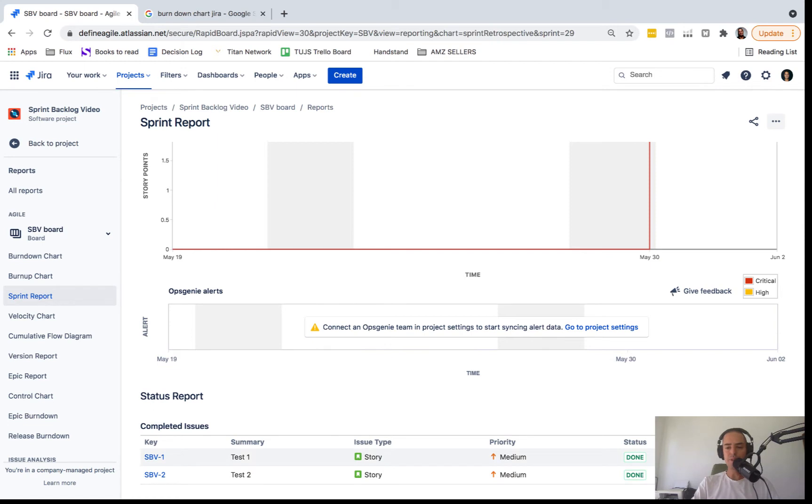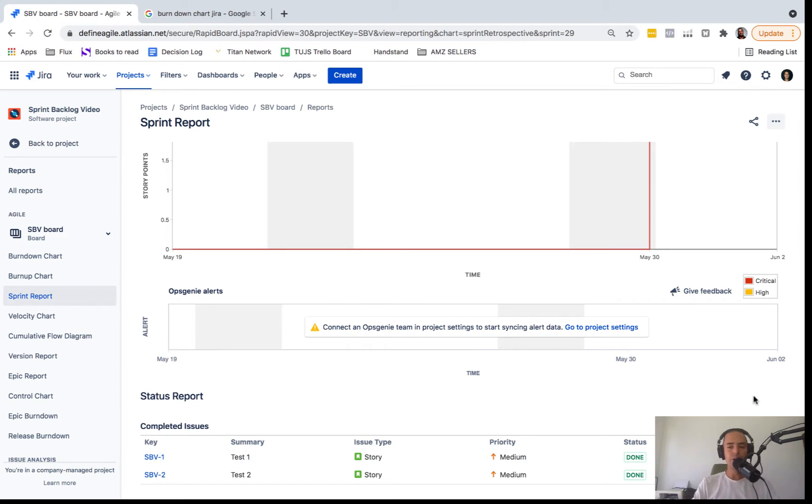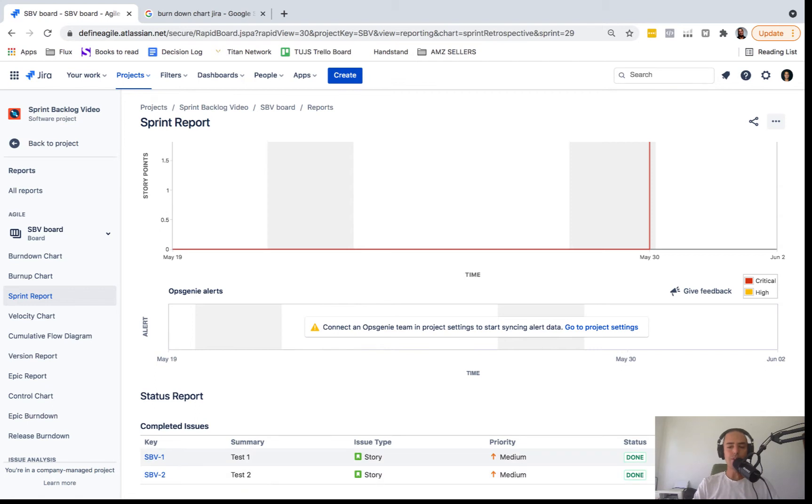But here when you look at the stories, it says nothing to two, which means somebody put an estimate after the sprint has started, which is not a good thing to do. But you can always see that in here, or if I change two story points to five story points, it'll be two to five. So this is how you read this.